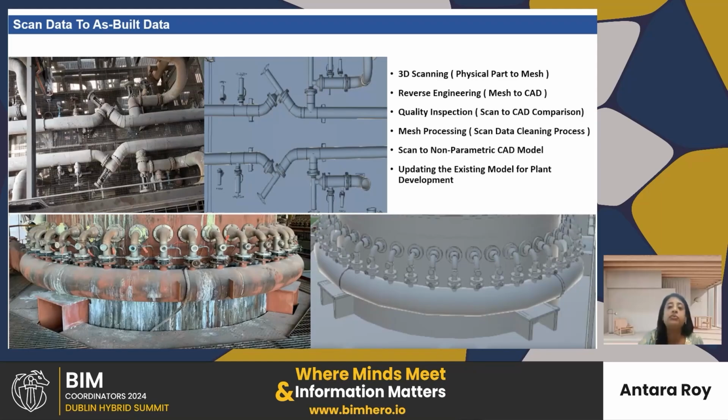Inside the building, you see this area with existing piping and an almost running plant, where some dangerous gases pass through. We need to create more piping here. So scanning helped us tremendously on this project, and as I told you, we saved almost 20% of the overall project cost.